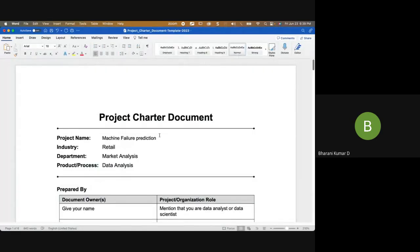Hello everyone and welcome to the session. The project charter document is the very first document that gets created on any project. Who prepares it? Usually the project sponsor has to prepare it — that's the best practice — but in most scenarios the project sponsor would ask the project manager to prepare this document, and the project manager has to include team members while drafting the project charter.